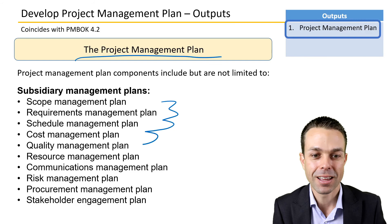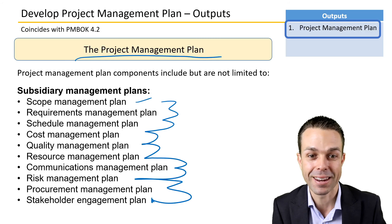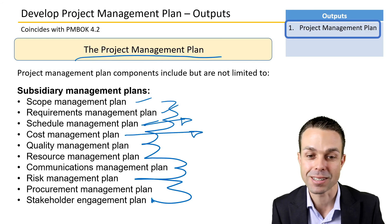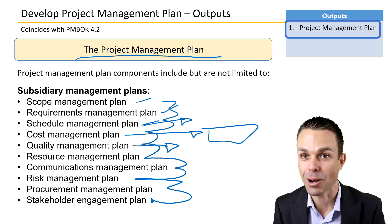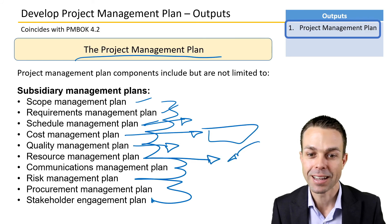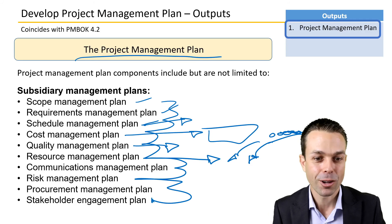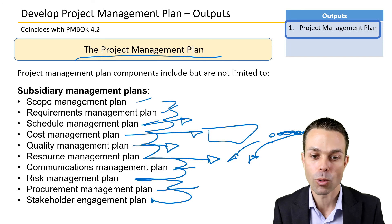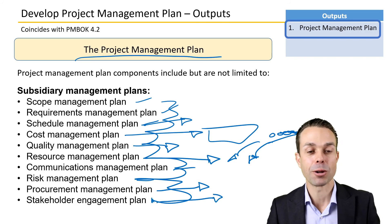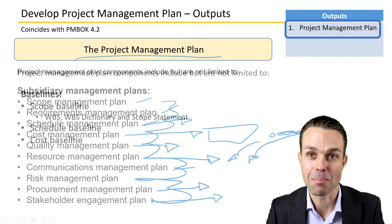The output of this process is the project management plan itself, which contains all the other plans we'll be creating. These include the scope management plan, requirements management plan, schedule management plan, cost management plan, quality and testing approach, resource management, communications management, risk management, procurement management, and the stakeholder management plan. All of these subsidiary plans go into the project management plan.